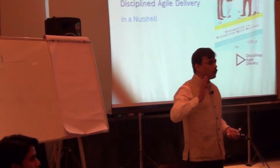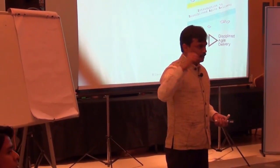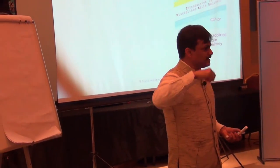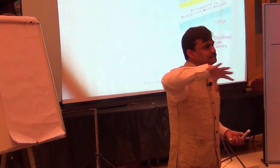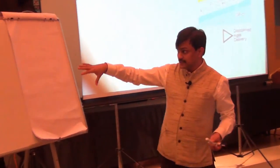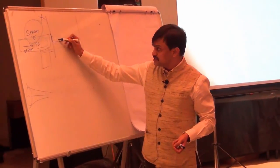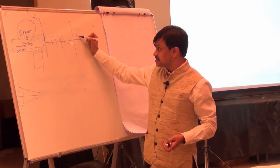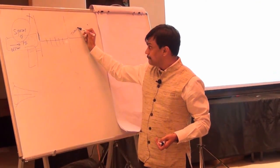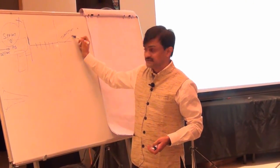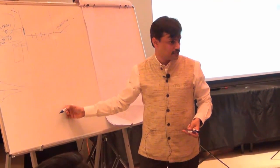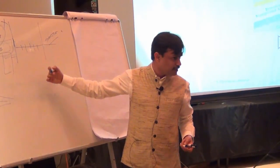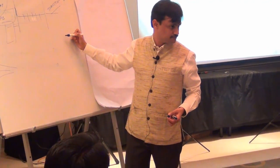And it is not giving you only one way of doing it. There was a discussion about whether Discipline Agile Delivery is against DevOps. They have three types of life cycle. The first life cycle, which looks like a lot of construction iterations and finally doing transition, is a basic life cycle. But there are other life cycles also. If you are in a stage where you can deliver frequently, you don't have to follow this.